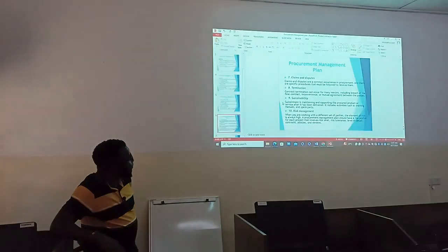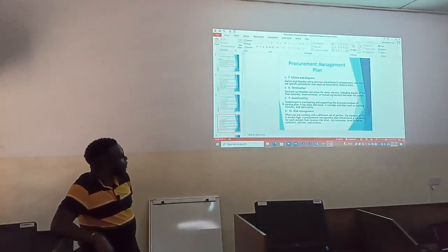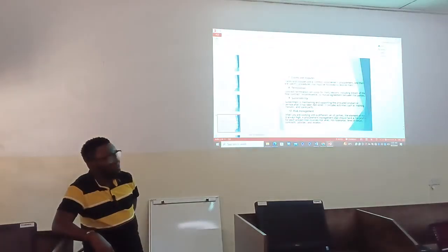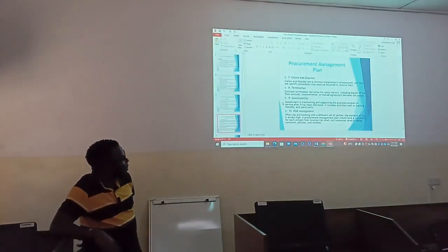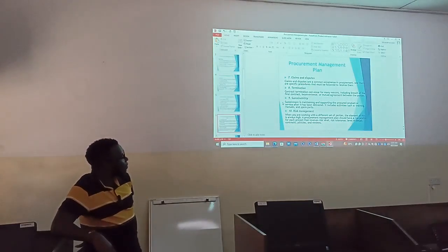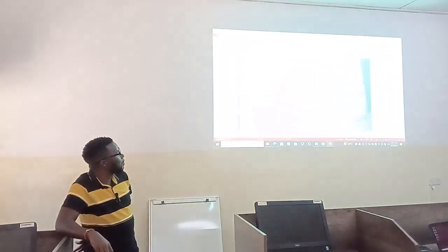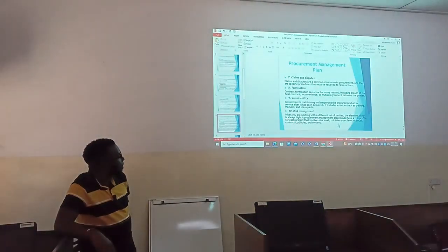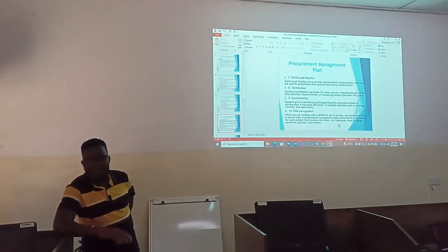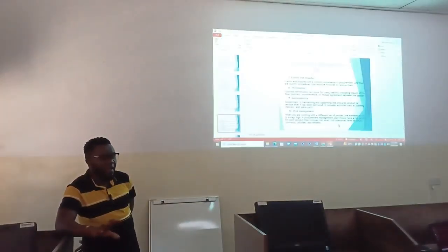So giving support or maintaining the procured products or services can be of great benefit. Some of the activities that can be there as part of the sustainability of the products and or services that you are procuring may include the training, having manuals, having spare parts handy.